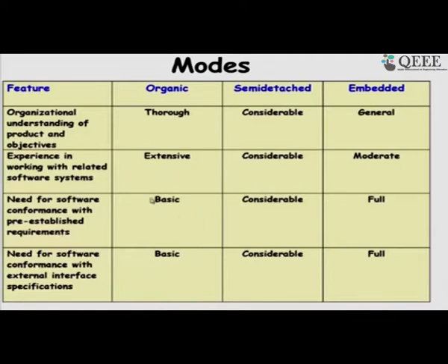So, very stringent checking with the requirements; if there is a full checking, then it will become embedded. Need for conformance with external interface specifications. So, it has to work with other software, and if there is a full need for such a thing, then it may become embedded.